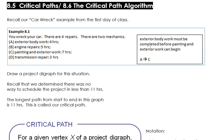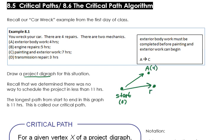We know that the exterior bodywork must be completed before painting and exterior work can begin. In other words, A has to be totally done before C is finished. If I was going to draw a project digraph, I know that I would start with a start. I could do task A, because there's nothing that has to be completed before A. And I could do task B, because there's nothing that needs to be completed before B. But I can't do C yet, because A has to be done before C. So C would need to go out here after task A.